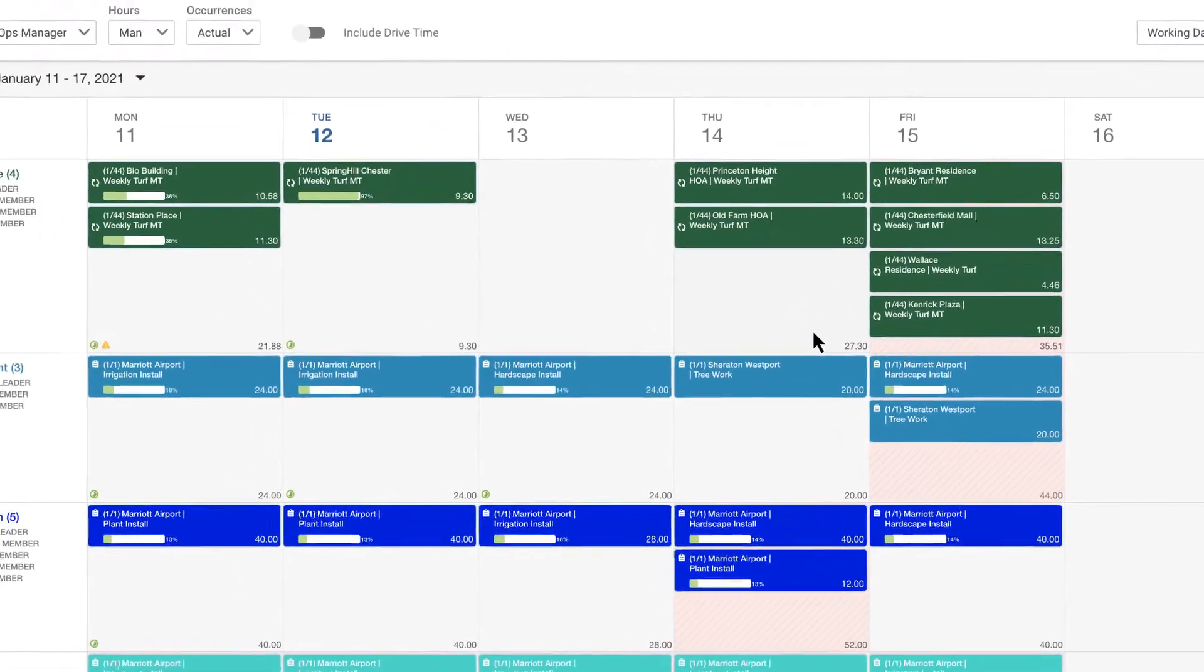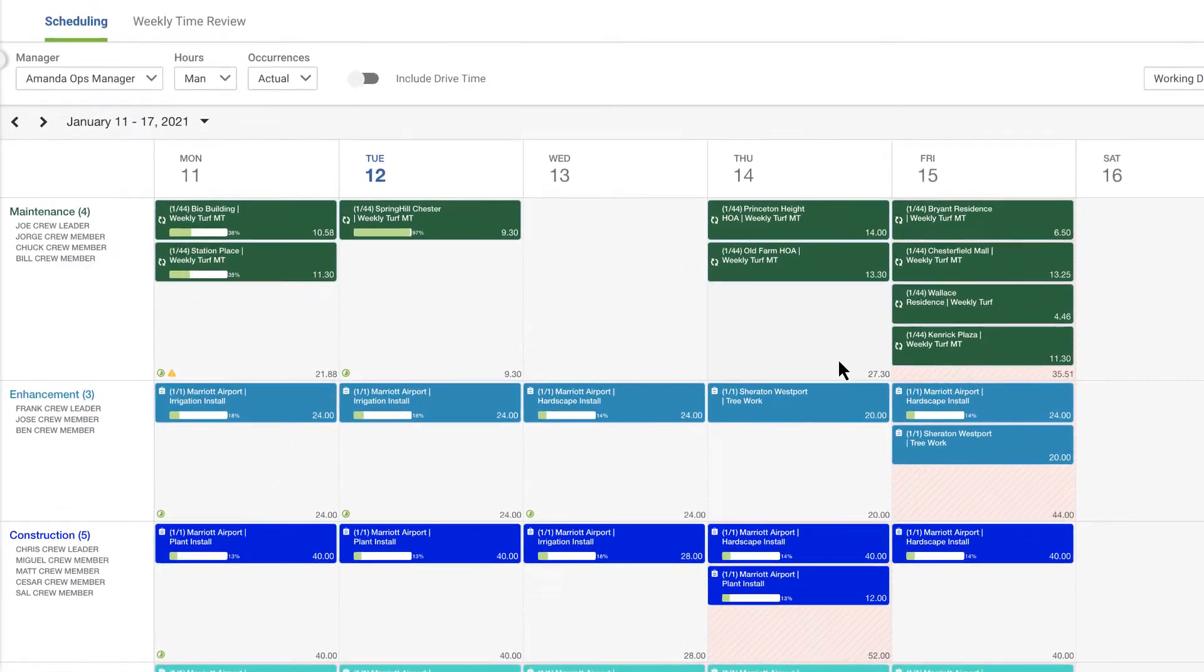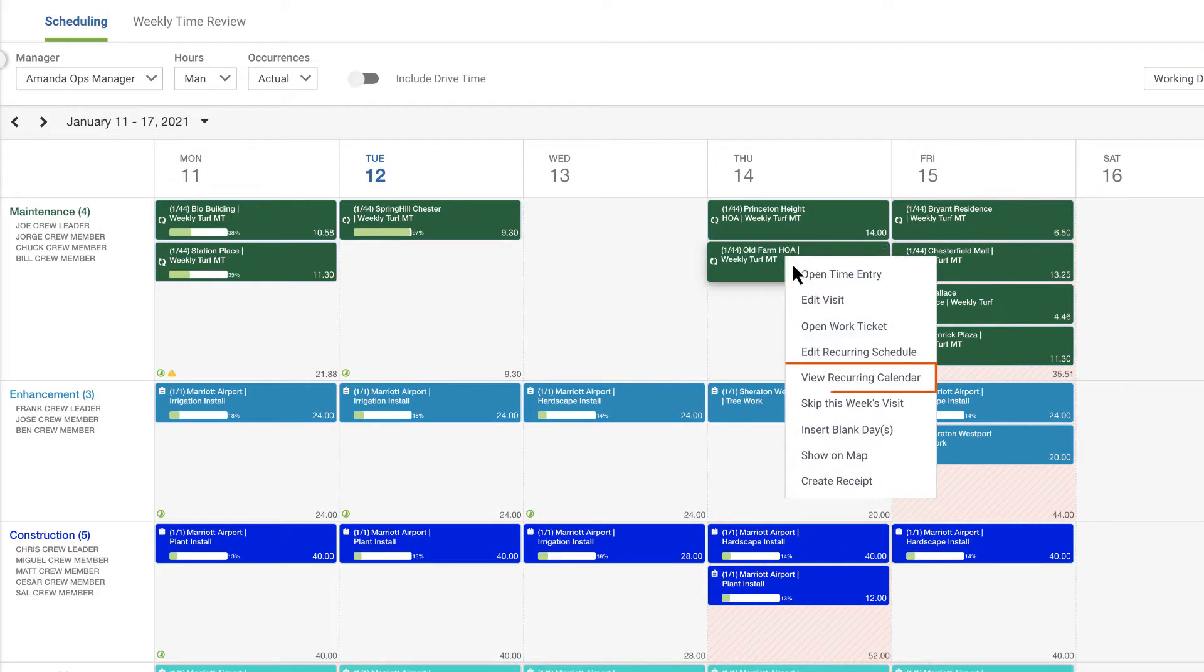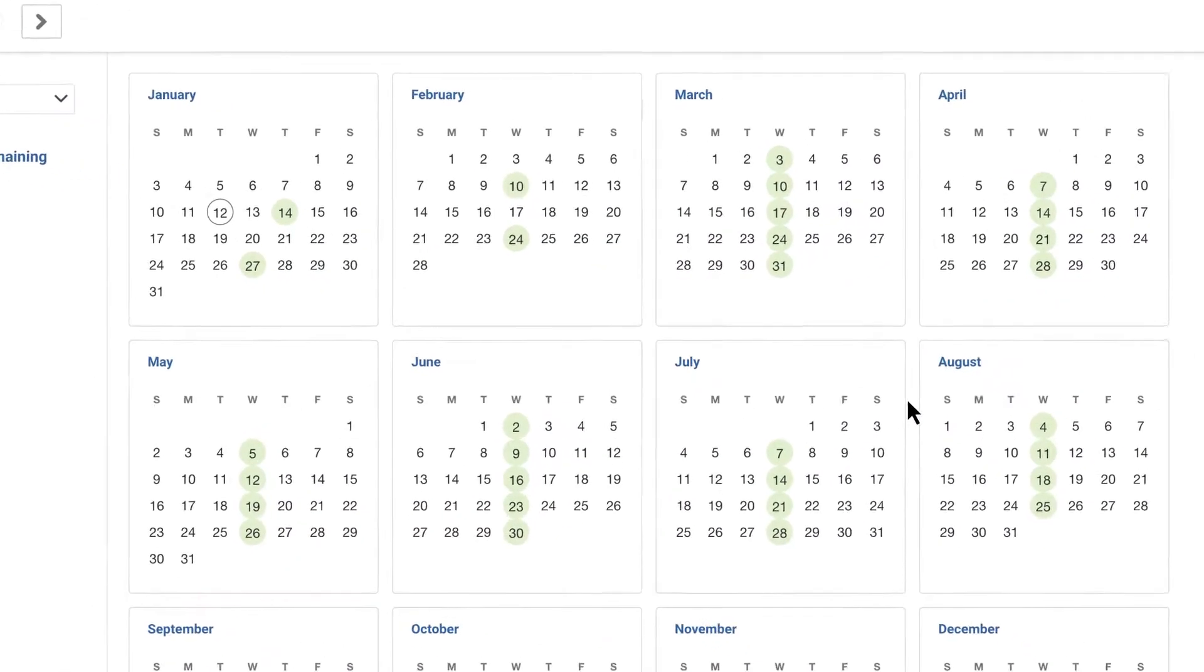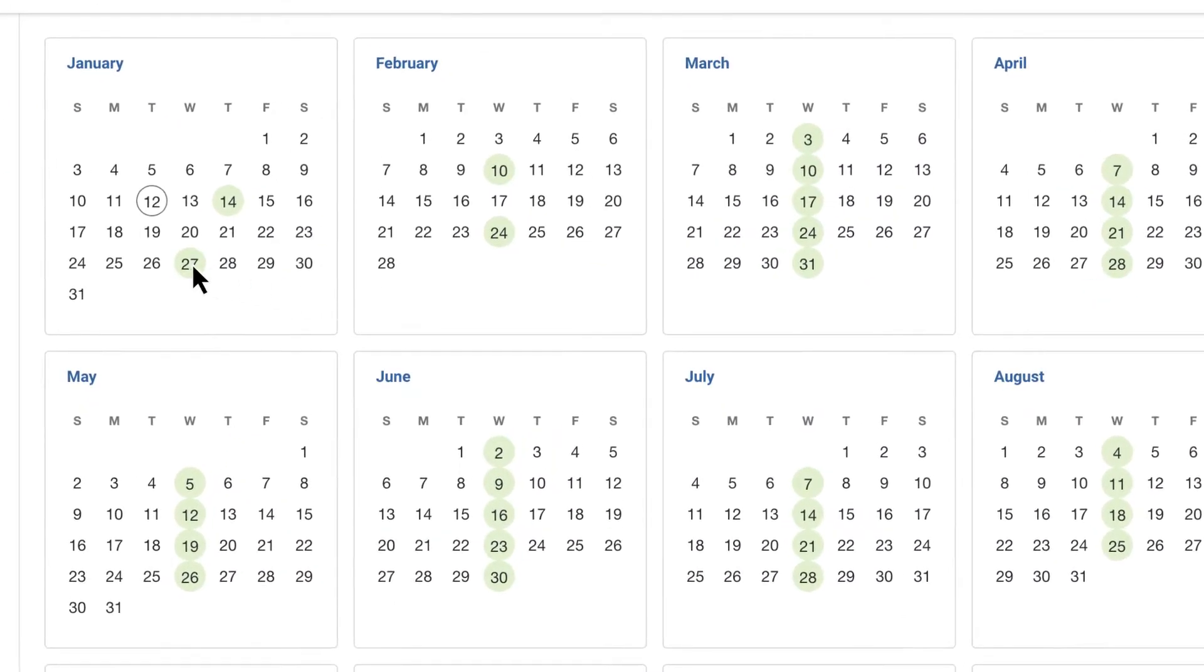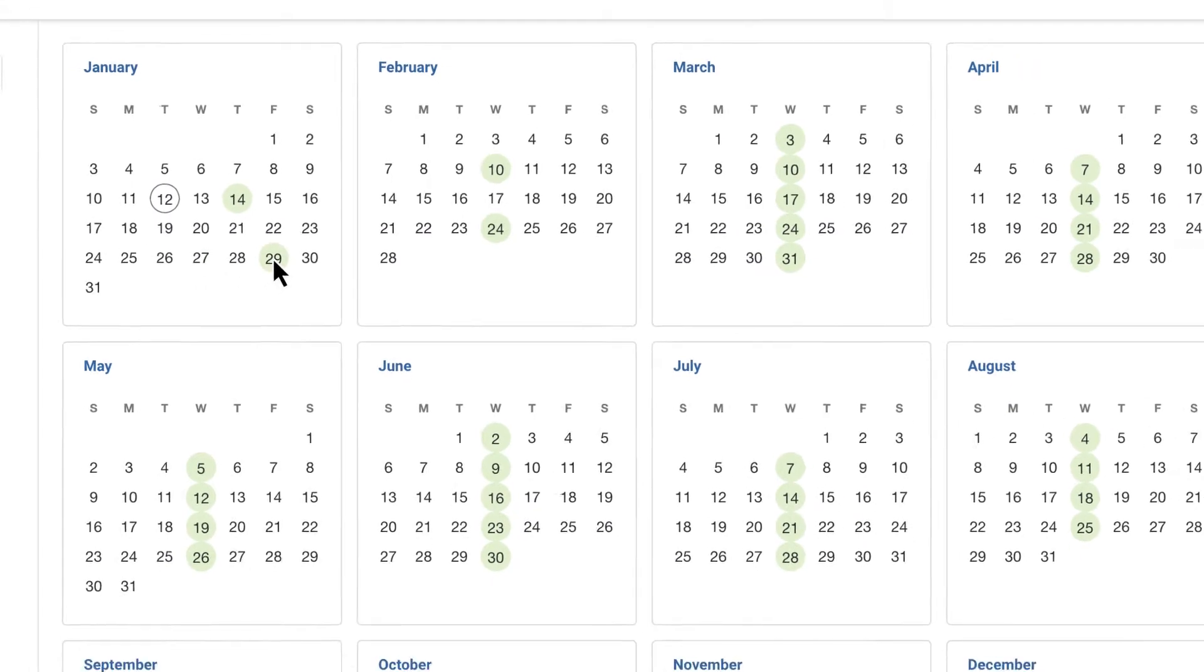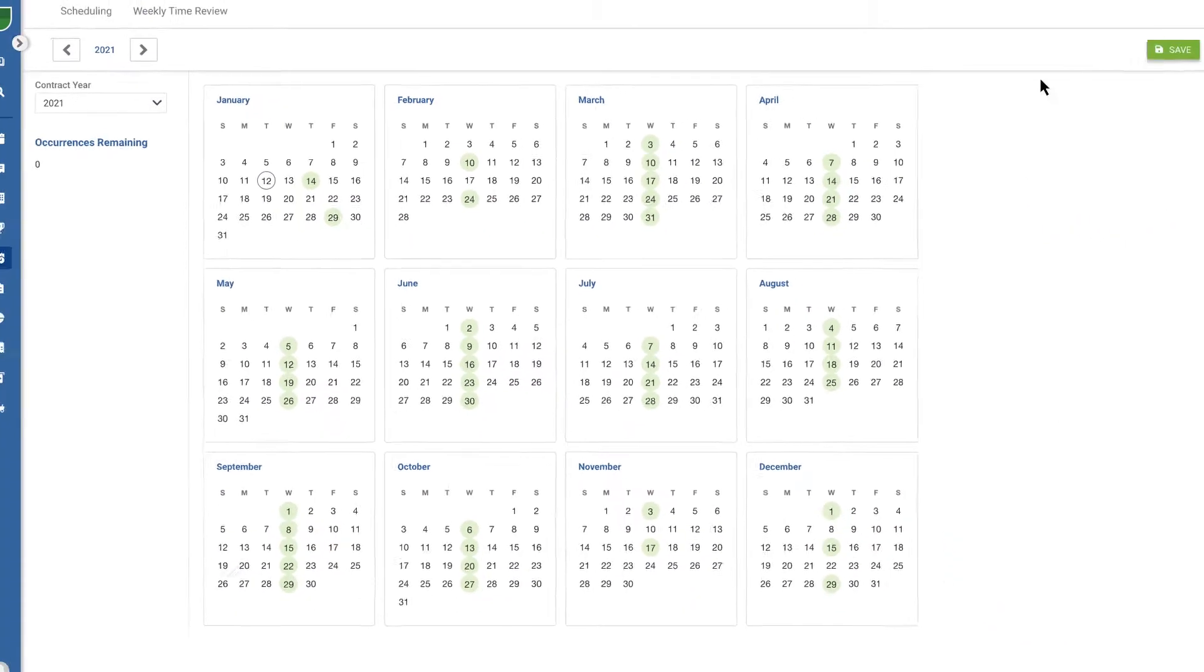Now let's suppose you need to change just a single day in the future of a recurring schedule. First view the recurring calendar, then select the day you wish to remove. And if you want to make up that day on a different date, just select the makeup date and that's all there is to it.